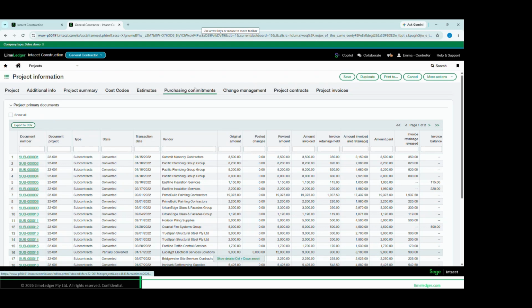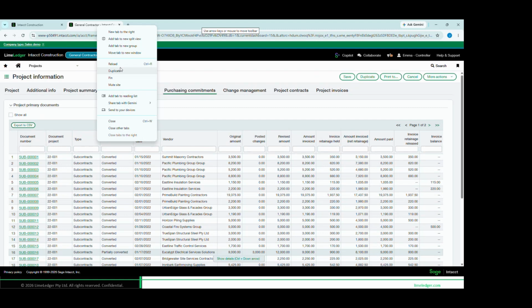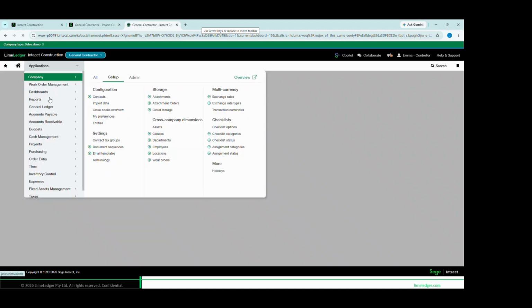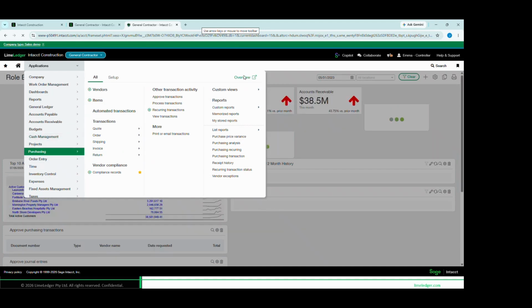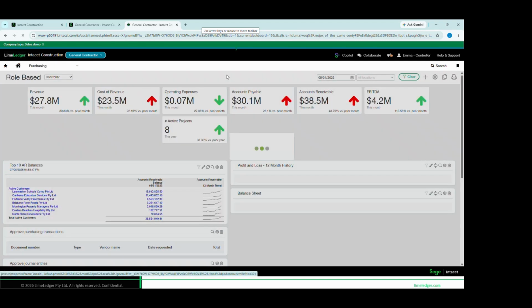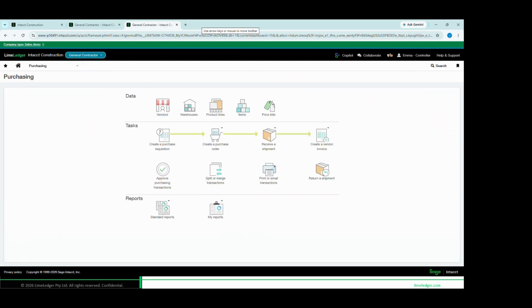So as we talk about project cost, one of the key considerations now is how you actually bring those costs into the system. I'm going to walk you through the options that are available here. Firstly, Sage Intacct comes with a full procure to pay workflow built in. So you're able to have a procure to pay workflow that starts off from a requisition to a purchase order before you get to an actual invoice. And at any one of these stages, you could have different types of transactions available. So in my case, at the purchase order stage, I've got the PO and the variation to it.